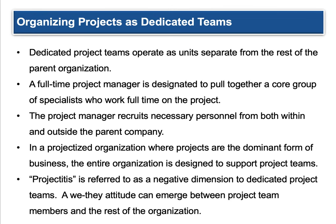Organizing projects as dedicated teams is kind of what we're doing in this class. Dedicated project teams operate as units separate from the rest of the parent organization — it's their full-time focus. A full-time project manager is designated to pull together a core group of specialists who work on the project full-time. The project manager recruits necessary personnel from both within and outside the parent company, looking for experts who can speak directly to the project. In a projectized organization where projects are the dominant form of business, the entire organization is designed to support the project team.